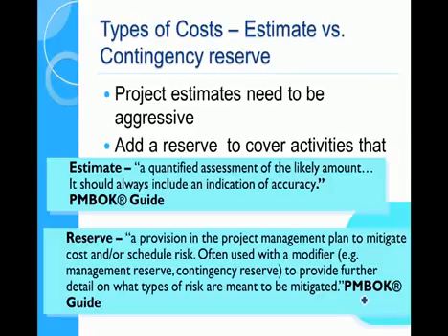But then we have another section which is called a contingency. That's where either our cost estimates might be too small, or a risk may occur on the project. In risk management, we're going to call that passive acceptance of risk. That means that we just have a slush fund ready to pay out risks as they occur. So that reserve is able to be used to mitigate against cost underestimates or risk, so to protect against our cost and schedule risk.